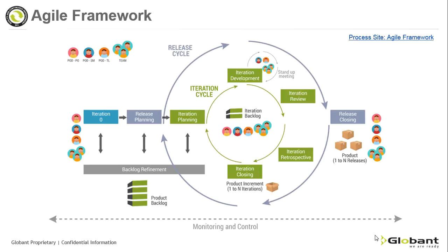Globant uses a sprint 0 as a good practice. This sprint usually has the same duration as a development one. But in this one, the teammates meet each other, environments are defined, the project is tailored, the team takes training, defines the criteria, and defines the first version of the architecture or design documentation.